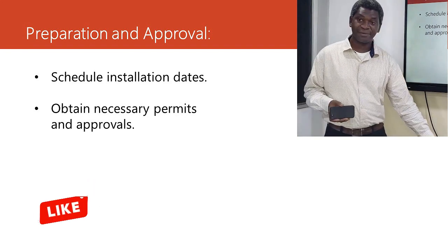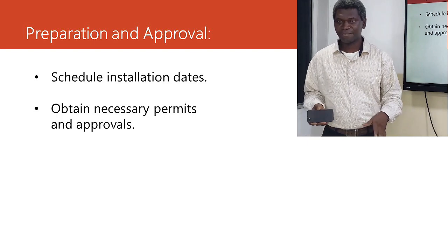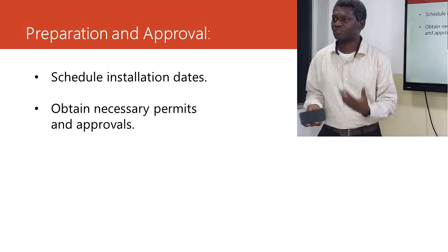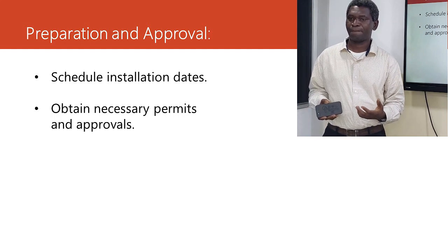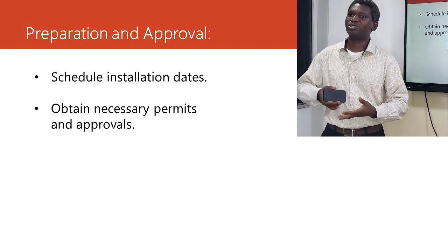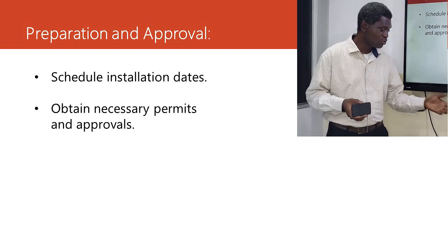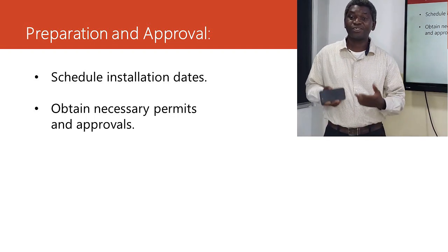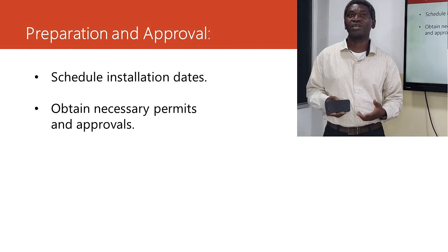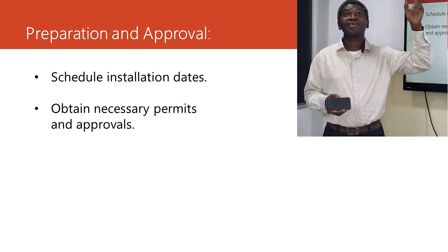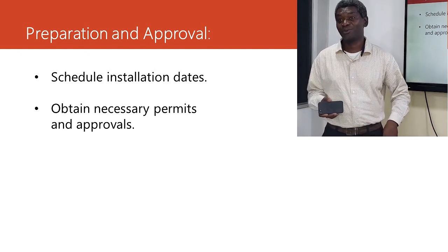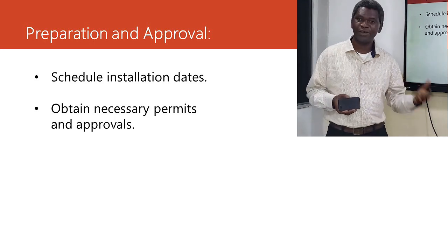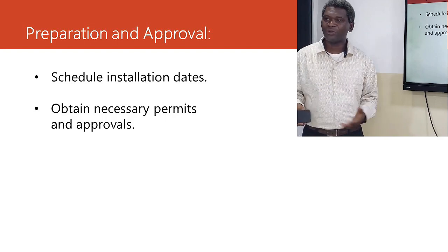This is indirectly linked to assessment and preparation. What do you need to do the installation? Do you need a ladder? Do you need resources? You need to prepare and communicate that ahead. It's not on the day you are going for the installation that you say, I remember, I will need labor. You should have known from the day of the assessment, so you plan for it.